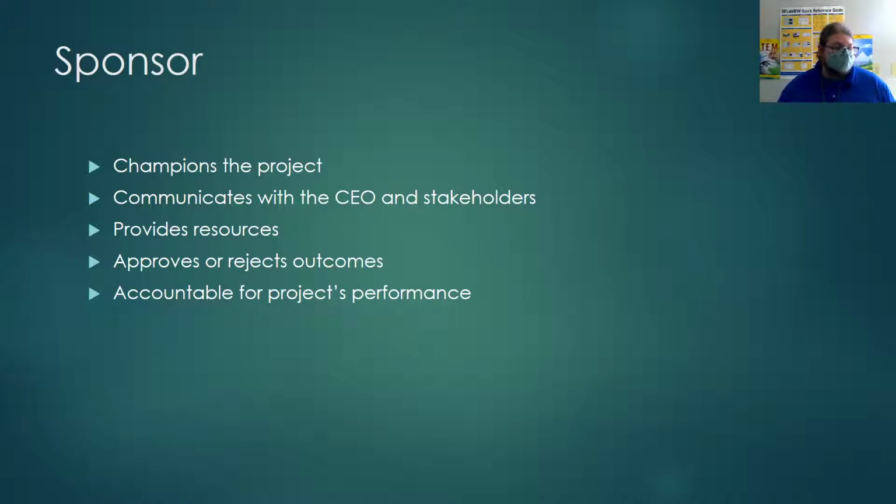This is the person that champions the project within the corporation or wherever they're working. They're going to communicate with executives, and they'll allocate resources for the project team to work with. So, if the project team needs extra people or needs equipment, they'll be in charge of getting the funding for that or getting the okay to hire extra members. They approve and reject outcomes, and they're also accountable for the overall project's performance. So, if the project is a success, then they look great. If the project doesn't do well, then they're going to be held accountable for that outcome.